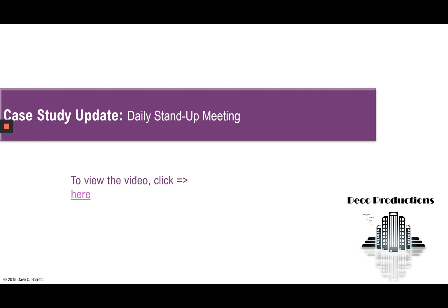Okay, so in this case study update, you would have seen the daily stand-up meeting occur. And as part of the daily stand-up meeting, each person on the team reports what they accomplished during the last workday to accomplish the sprint goal, what they plan to accomplish the next workday, and any obstacles that may be blocking them.